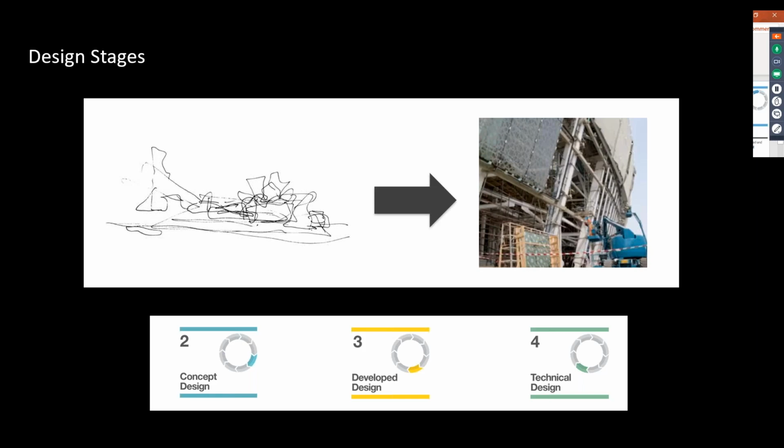And in many instances, there is not a prescriptive way of defining how the end of stage 2 works. So let me come on to this. But the end of stage 3 is absolutely crucial, because obviously we would on the whole be going for our planning application then, and of course the end of stage 3 kicks off a whole ton of additional work in terms of each specialist subcontractor or design team member producing specific information for each building system. So I'm just going to walk you through some of the points related to how we've set the boundaries between those 3 crucial stages.